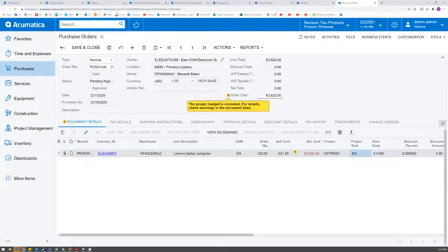The system notifies me that the project is exceeding. So I can see there is a yellow exclamation mark here. And then it guides me through this screen here, and I just point the circle there and read through it a little bit, because I know I have no budget here. Would that be okay if I want to start it? So whether I decide to reject or approve, this is the information that will be my decision from now on, right? So I don't need to manually go back to the project and check whether the budget already exists or not, because the system is telling me already that this one doesn't have any budget at all, zero. So my project is going to be minus 63,222 here. All right. So let's move to the next area a little bit.